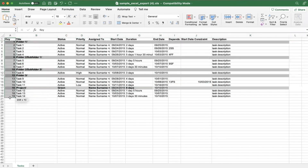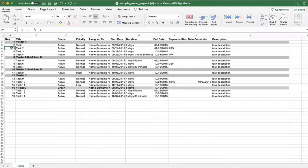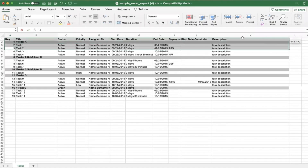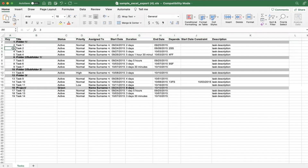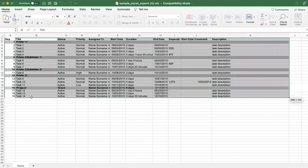We have to have this key column — this is always required or it will error out. This is typically why you get an error saying something like 'error in key three,' which tells you there's a data issue in that specific row. We need it both from the error standpoint and because the import requires it. The names of the tasks, projects, or folders go here in column B.